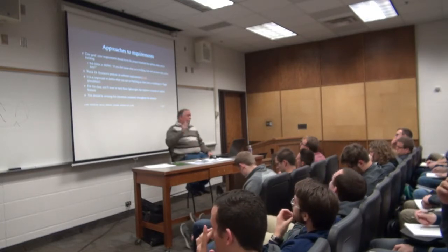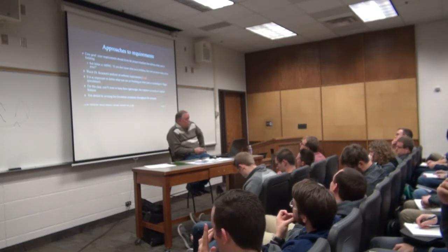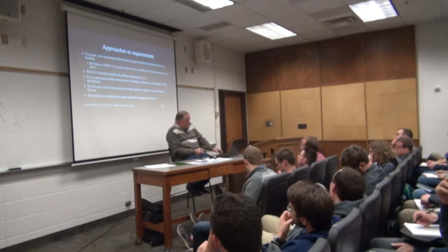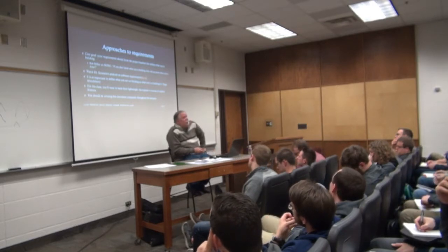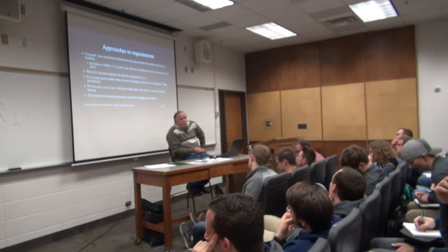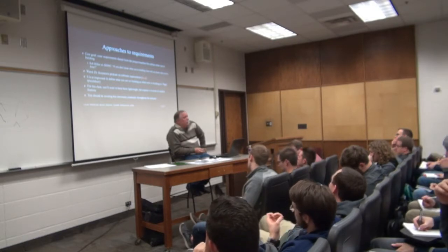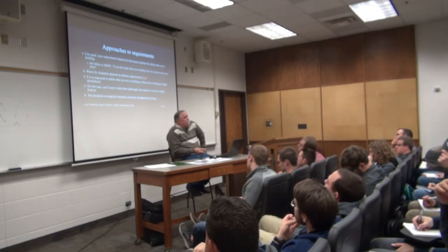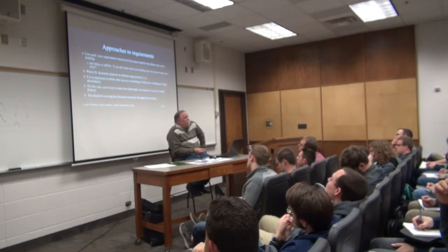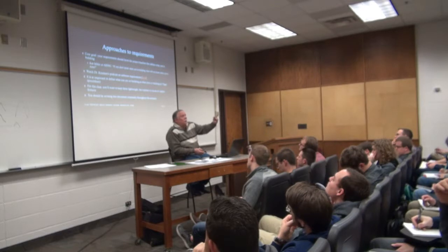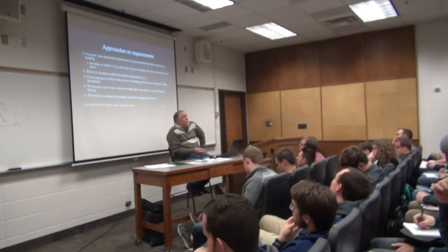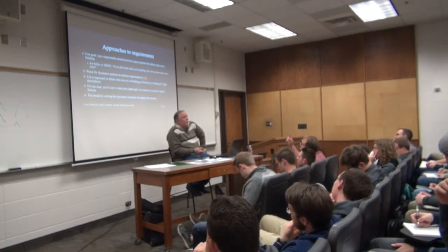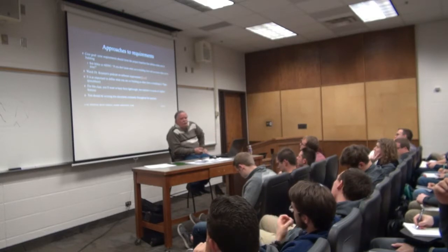Bob Millar, who was at Motorola, started the same day I did. He was coming there weekly to get the project on track. The first thing he asked for is, where's your baseline for this subsystem? And the ARINC managers all sort of looked at him puzzled. He says, where are the notebooks? Where's the requirements that say what you're building? And they still didn't have anything.